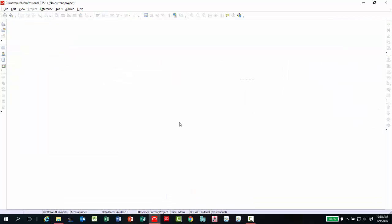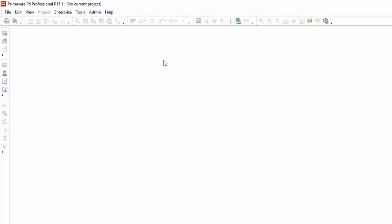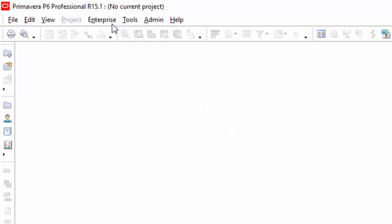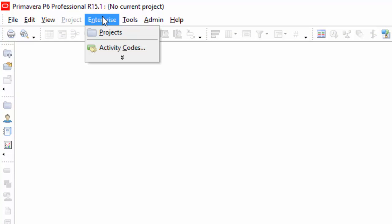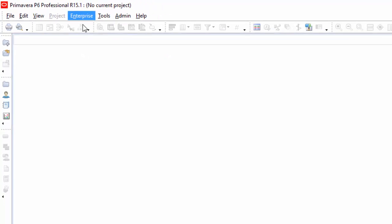Next, you will need to display the EPS structure. It should list all the projects assigned to that database. If the structure is not shown, go under the menu item Enterprise and select Projects.